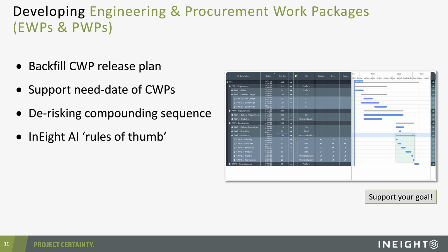That green highlighter encompassing the half dozen or so execution activities is showing that the preceding procurement and preceding engineering scope is in alignment such that there is no breach of the path of construction in the execution phase there.